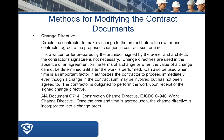I typically try to avoid using change directives, and contractors generally don't like them. I will use them if time is of the essence and we need to get the change implemented so it doesn't delay the project, and we don't have time for the usual change order process of getting a proposal, getting the price back, and getting owner approval. If something is on the critical path and will impact the schedule, I will issue a CCD — a Construction Change Directive. The contractor is obligated to perform the work upon receipt of the CCD.